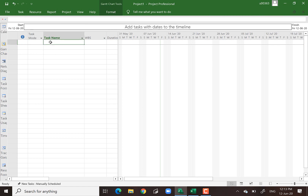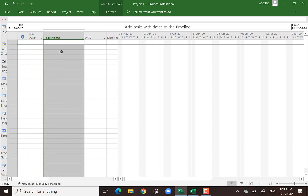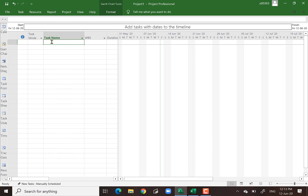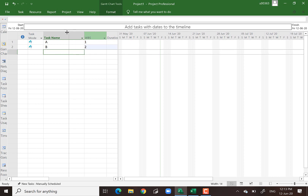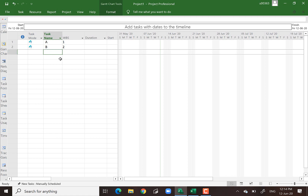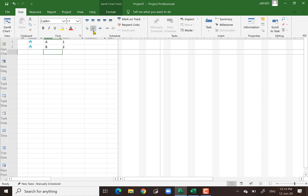Now let's look at how to input data. We input data under the Task Name column. When I type A and then B, the WBS shows as 1 and 2 — meaning both items are on level one. When you input your data, you must organize your work by pressing the Indent button so your activities will fall under the WBS you want. Otherwise it will not be accurate.